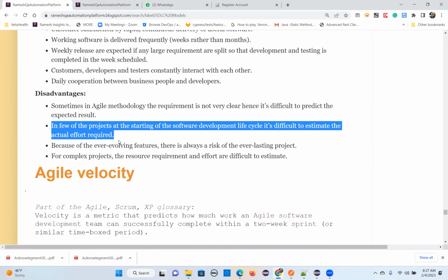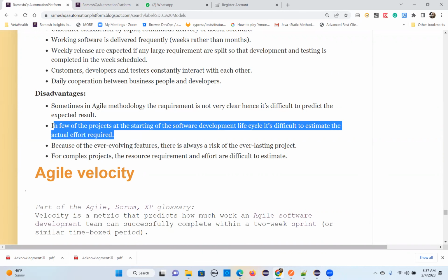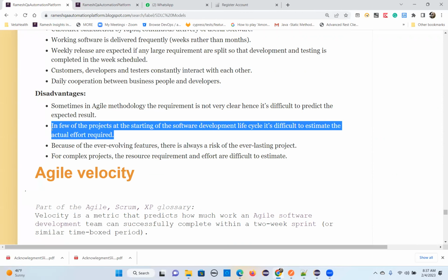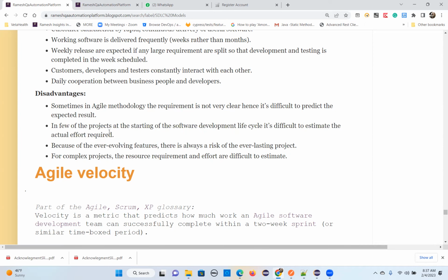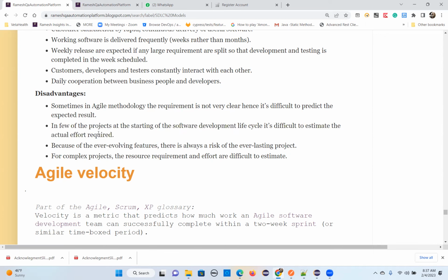But if extra work is coming up, then you can inform in the meetings: yeah, I'm getting extra work, so I think we need to increase the story points. You can tell that. And make sure you give the reason why you need more story points. You justify that with the points, maybe what extra work you got. That is one very important point you need to consider.